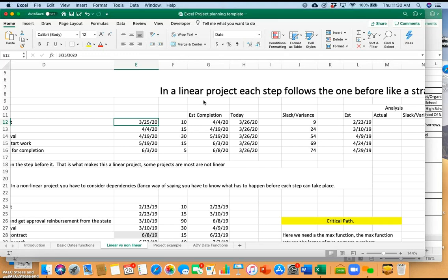Now, it's possible that we had an estimated completion date of 4/4. We'll do it earlier. But every day that's ticking down. So when I look at my project, I usually don't look at the fifth item down right now. I'm going to look at the next two. And as a manager, if you're doing this with your team, when you're hitting under 10 days, well, this one's only a 10-day item. But if you've got an item that was originally 40 days and you're hitting 10, that's when you're emailing somebody and saying, what's the story? Are we on track or are we not on track?